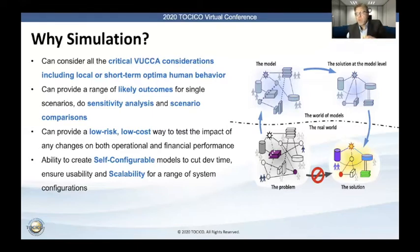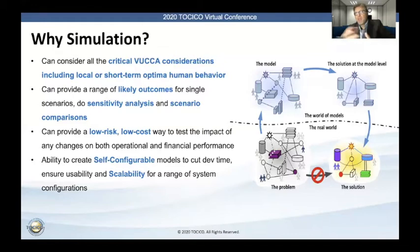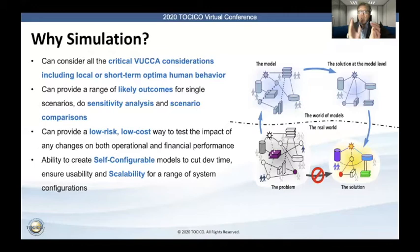We can also do very importantly sensitivity analysis — selecting one parameter, for example the one I'll present today: we know it's good practice to control work in process. If you're starting everything as soon as possible, everything will take longer and you'll get much less done — you have to limit the work in process. But what's the mechanism — should we limit it at the program, project phase, or task level? And what is the number? Are we going to limit it to five programs, ten, or fifteen? With sensitivity analysis, we rerun the model with multiple replications, stepping through each parameter value, and see what the graph looks like — a sort of inverse U, where too little WIP starves critical resources, too much causes constant multitasking, and the Goldilocks zone is somewhere in the middle.